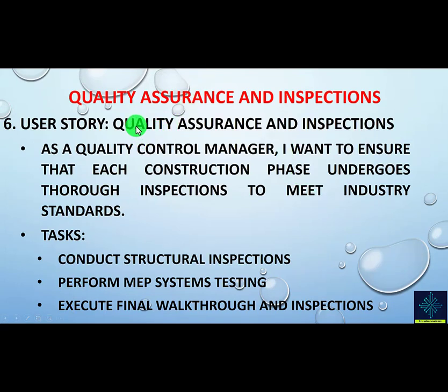Another example is related to quality assurance and inspections. This comes from the quality control manager. As a quality control manager, I want to ensure that each construction phase undergoes inspections to meet industry standards. Tasks involved might include conduct structural inspections, perform MEP systems testing, execute final walkthrough and inspections.